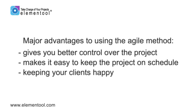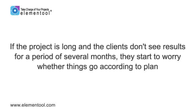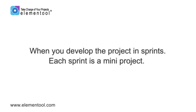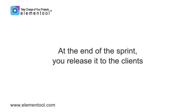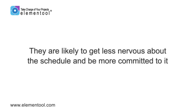Agile development also helps in keeping your clients happy. This is something that many people are unaware of. While you work on the project, your clients wait to see results. If the project is long and the clients don't see results for a period of several months, they start to worry whether things are going according to plan. They also sometimes forget why they ordered the project in the first place, and might change their mind about it. When you develop the project in sprints, each sprint is a mini project. At the end of the sprint, you release it to the clients. This shows them that the project moves forward and keeps them in the loop. They're likely to get less nervous about the schedule and be more committed to it.